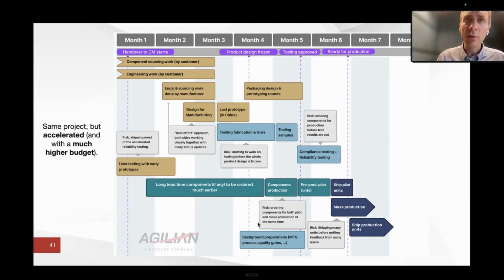And what's very important is that risk doesn't just mean, oh, there's the risk that things go wrong, so you waste a little bit of extra money. Risk can set you back. Sometimes you waste 2 months on your project, so you need to add an extra 2 months just to go back, do things properly, and then go back to the phase where you were, right?